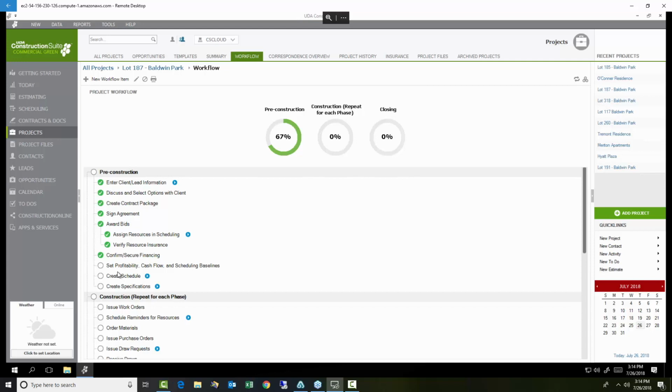In the workflow, you're providing steps primarily for in-office work to make sure that all the documentation is done. I love the workflows that some of our clients create that include things like building the handoff package, so that the sales rep can put together and include all the different documentation that the project manager wants. This is an excellent phase in a lot of workflows. You'll tend to see this as a pre-sales portion up above. It's perfect because then you're bulleting out everything the project manager wants and you're streamlining that handoff.